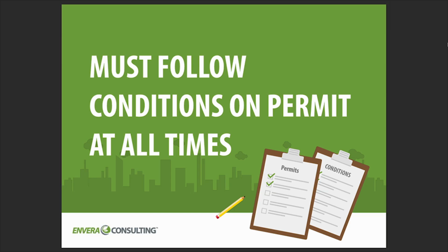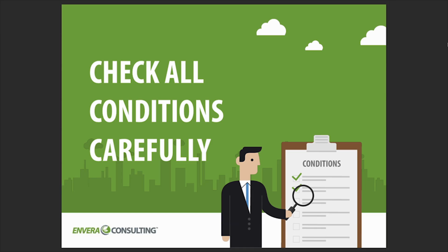Now, like I said before, permits will have conditions listed on the face of them, and it's important that you follow the conditions of the permit at all times. Now, it may seem simple, but you'll actually be surprised at how many times there are errors noted on the face of the permit. And the fact that there is an error on the face of the permit can cause a lot of problems because you have to comply with the conditions as noted on the face of your permit.